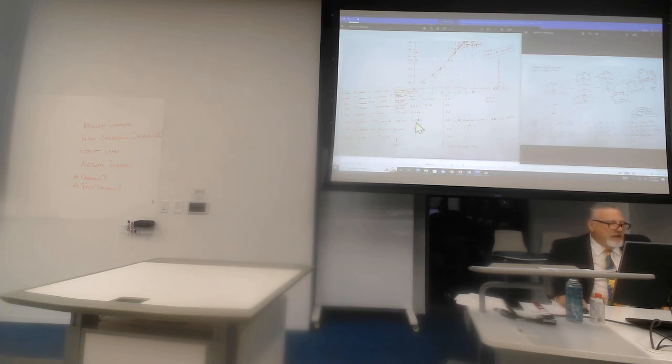So we charge ourselves J. The reason I didn't want to do J is because it's $9,000. It's more expensive, right? But we have to do it. So A, A, J. Now when I say we have to do it, there's other ways to do this, right? You could have chosen to crash F. And then you'd have a problem here. You could have had to dump E and F, cost you more. We're looking for the lowest way to reduce one more week. And in this case, it's A, A, J. That gets us down to 25 weeks.